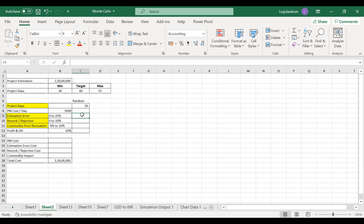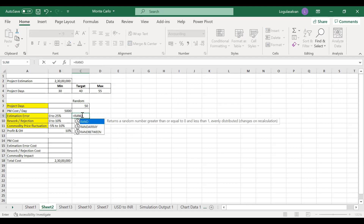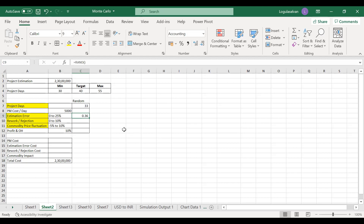The next randomness is for the estimation error up to 25 percent. Here we will use a different function called RAND. What RAND does is provide a random value between 0 and 1 — clicking it gives 0.78, 0.96, 0.64 — the value will be either 0 or 1 or anything like 0.4 or 0.38 between 0 and 1. But here I only require up to 25 percent, so I will divide this by 4. The output value will get restricted up to 0.25, which equals 25 percent.